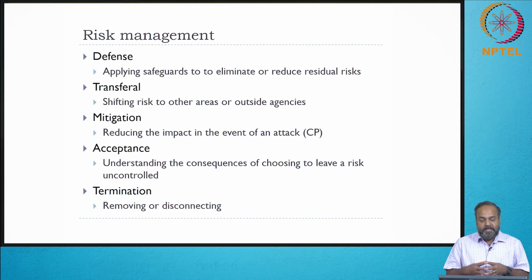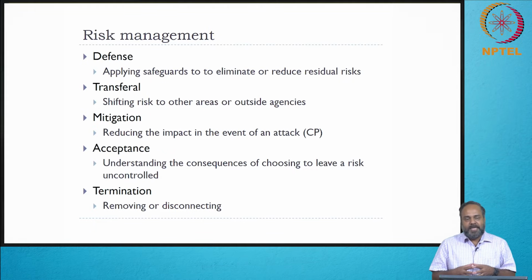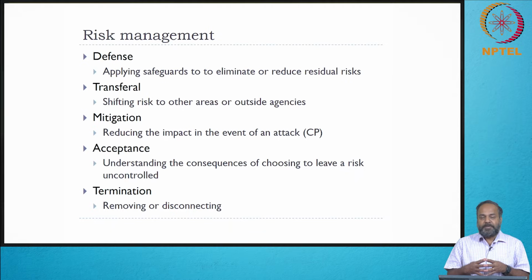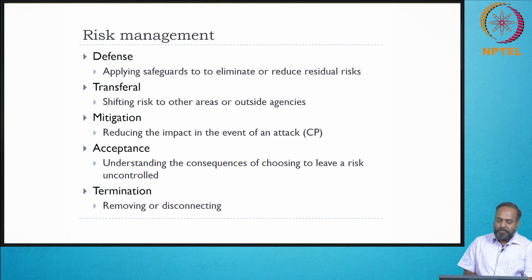you can arrive at the final measure for calculating risk. We also found that risk is an overall measure, which we call residual risk, the risk that is left after implementing certain protection mechanisms. Residual risk is the product of loss frequency and loss magnitude, minus the protection from existing systems, plus a measurement uncertainty, not just error. You can actually calculate measurement uncertainty from the error. So that is the residual risk at a very detailed level of quantitative measurement.